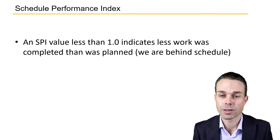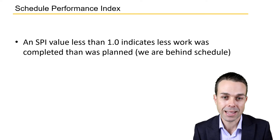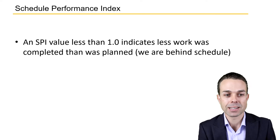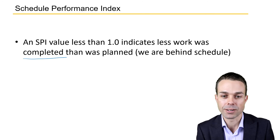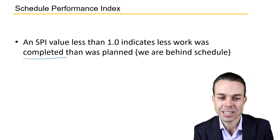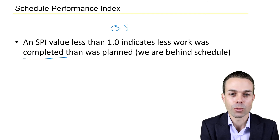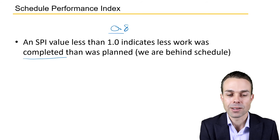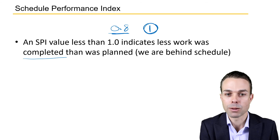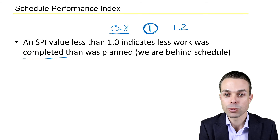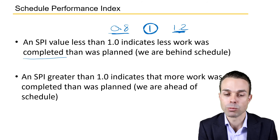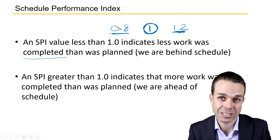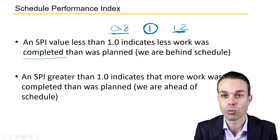If we end up with a value less than one, this indicates that less work was completed than was planned, so we're behind schedule. For example, 0.8 means less work than the 1.0 we had planned. If we had 1.2, that means more work was completed than planned, so we are ahead of schedule.